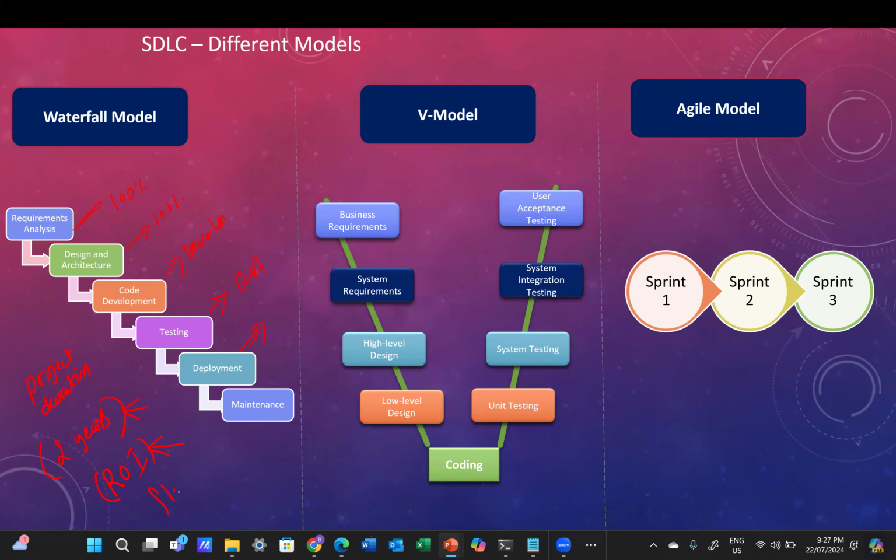Another drawback is flexibility. It doesn't have any flexibility. Even if they want to make small changes to the requirement, this model doesn't allow the change. It has to go through a lot of process to incorporate any additional requirement. That is one of the biggest drawbacks with the waterfall model. And obviously, you cannot start your QA until the complete code development is done. You can't even start your preparation activities. Altogether, it impacts the overall project duration and also the end user satisfaction.